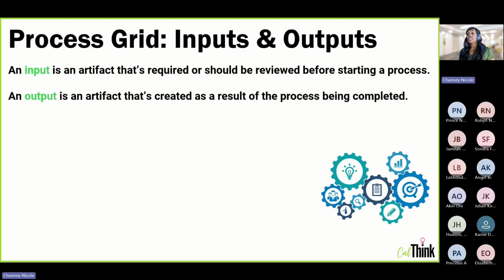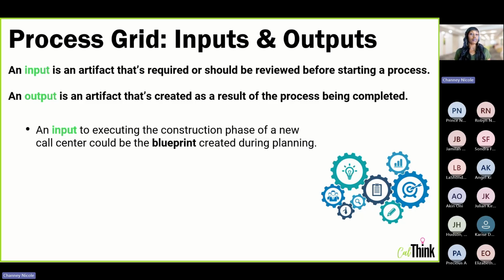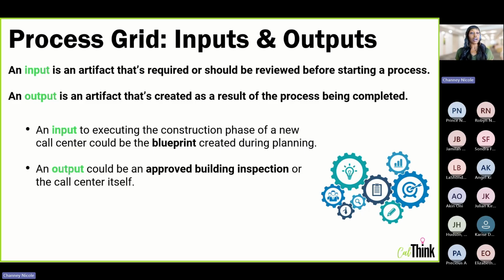So an example of this, let's say that we're building a new call center from the ground up. Well, an input to the execution phase of that building project could be the blueprint that was created during planning, because we need that blueprint to direct us on where to lay the foundation, build the walls, install the doors. An output could be an approved building inspection, or it could be the call center itself, right? The final product of that process.